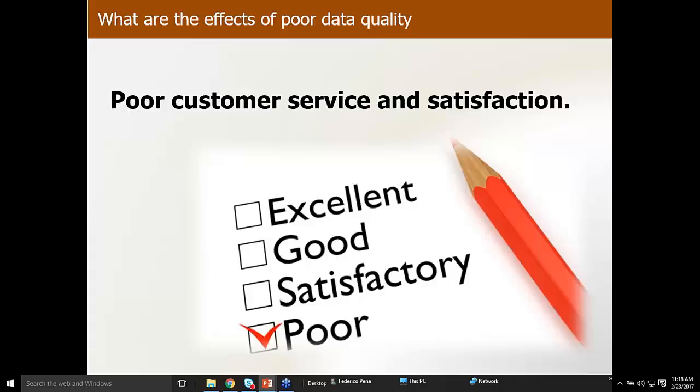Your particular assignments are skewed or flawed, and you're stating that within another global component of your organization, you're looking for X number of new sales reps. As a matter of fact, the main issue is that one of the project managers forgot to remove those assignments from projects that were closed. So now it's providing a negative financial impact to your organization and to your clients, as PPM users.